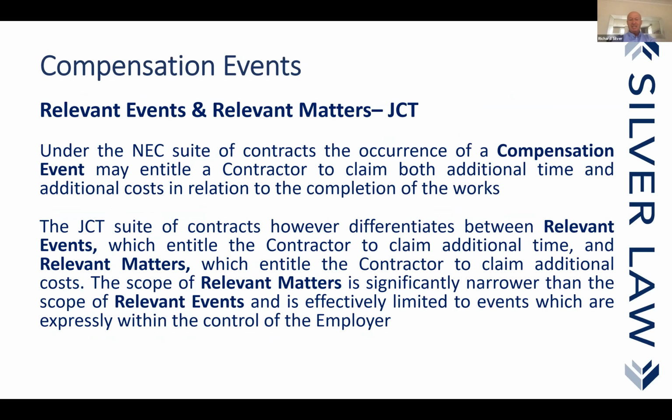Under the JCT, and I imagine most of you have experience on that, we don't have that nature of problem. Under the JCT, we have a separation between what are variations and are simply to be valued in accordance with the contract. We generally have a ladder of events or methods of valuing. So if we've got a BOQ, use the BOQ. There's no rates in the BOQ, you pro rata. If you can't pro rata, you establish a fair rate. If you can't do a fair rate, it may be day works. So there's a set down method of evaluating.